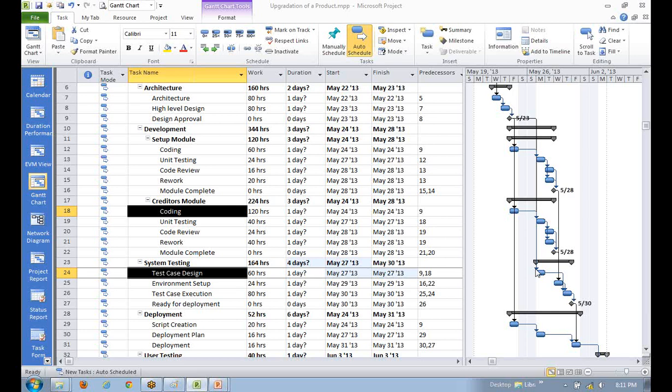So you have to do the makeup. Like test design looks bad when it is happening while the coding is happening, because the people are already engaged, like the beautician is already engaged, right? So you make it dependent on the beautician. We say the programmer is there on the coding and the same person will do the test case design, so we make it dependent on this. So now test case design will happen after coding, and there is no resource conflict.